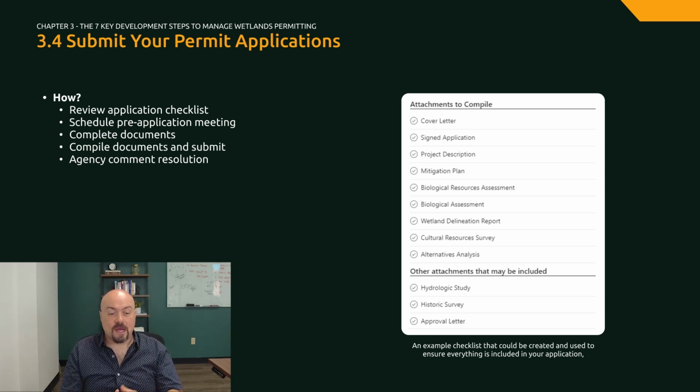The pre-application process is your time to discuss your project with staff, but it is important to be informed about what they are looking for and even have draft documents for them to review. Depending on your division or region, you may be given specific instructions about what to submit for the pre-application meeting, or it may be more general. At minimum, you will want to be able to explain and quantify your project impacts and how you will mitigate for them.